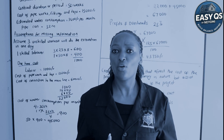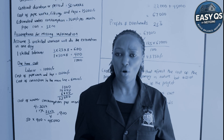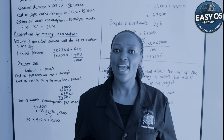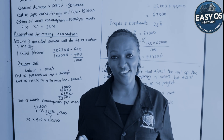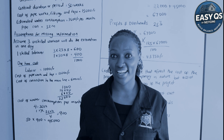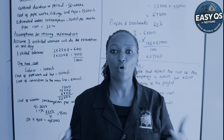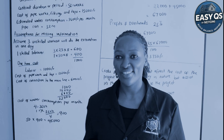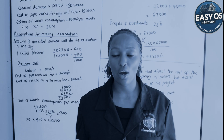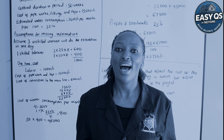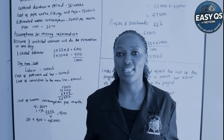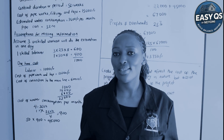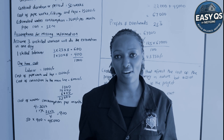You break down the cost of materials, transportation of materials, labor costs — for example for building a wall — and plant and equipment costs. Then you add profits and overheads. An overhead is an indirect cost to the construction — for example, if the contractor has to fuel his car to come to the site. These are costs he encounters that are not priced as materials, labor, or plant, but are indirect to the project. The contractor must always add a percentage for profits and overheads.